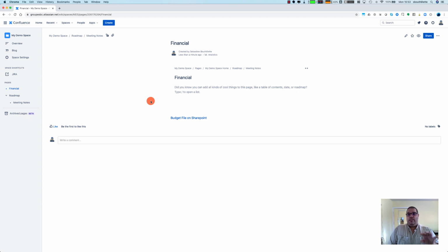On a weekly basis, I'll scan through it to see, are there any of those risks that I'm not seeing or not considering, kind of as a reminder, and then I'll bring those into my executive summary if I have to highlight that we have a risk. We should either think about a mitigation plan or activate the mitigation plan that we've planned for at the beginning of the project.